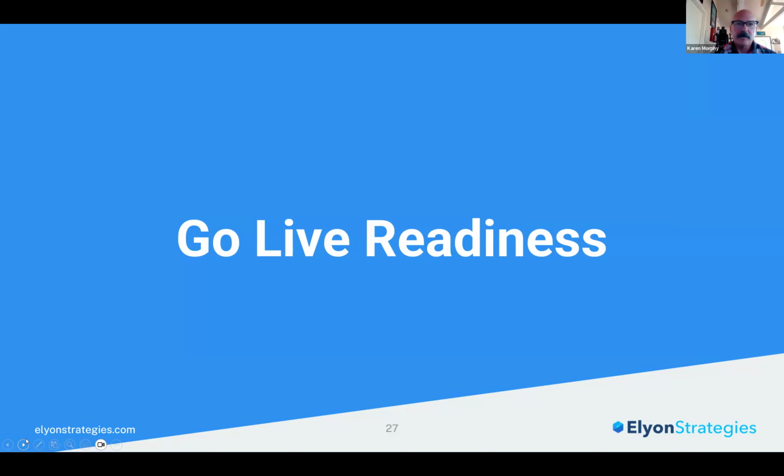Due to that person oversleeping, the go live was delayed by several hours and put the business into a frenzy, because they didn't know whether they should back out and use their old system or go with their new system. The learning from that was that you want to look for single points of failure in your go live readiness. Where do you have individuals who are the only people who know how to do something? So that was a learning for me.